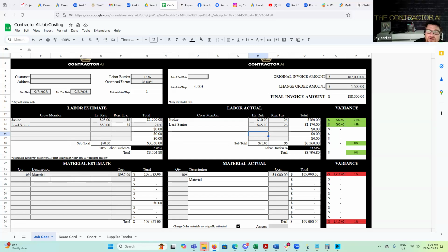Let me give you the SOP for the overhead recovery. The way that we do it, because we have seasonality to our projects, is whatever the accumulation of the month was. Let's say my break even's like 350K. That has to be billed, right? So let's say we came in at 300. Well, I'm going to add that into my very next month's pricing. So it's not going to catch up for 3 months.